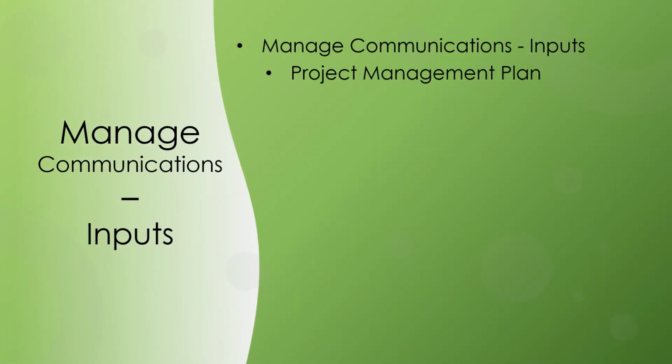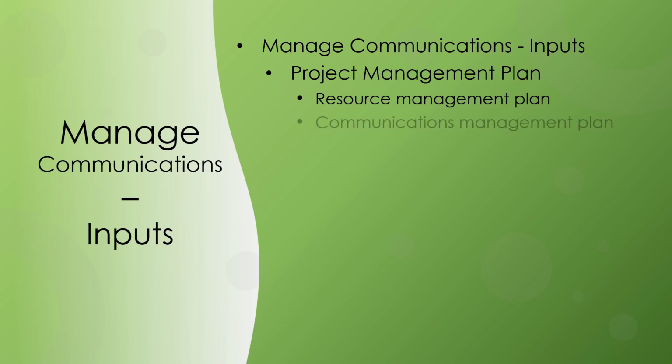Project management plan components include the resource management plan. The resource management plan describes the communications that are needed for management of team or physical resources. Communications management plan: the communications management plan describes how project communications will be planned, structured, monitored, and controlled. Stakeholder engagement plan: the stakeholder engagement plan describes how stakeholders will be engaged through appropriate communication strategies.